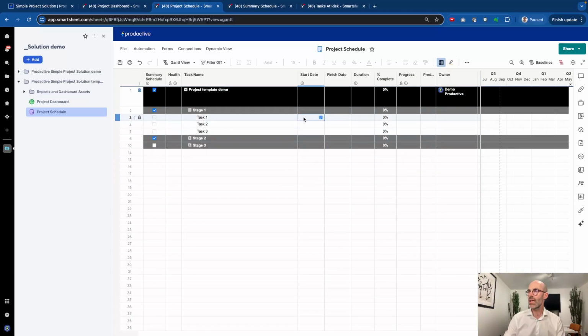But currently there's no dates. So if I put in T for today's date, it's going to come up with the 9th of September, and it's going, well, blimey, this task is looking like it's almost going to be overdue. If I put in yesterday's date, so T-1, you'll see that the task is red, and therefore the overall project is red as well. If I now make this 5 days, you can see it's on track because it's due to be ready. And if I start adding in information in terms of what's the percentage complete, you can see at the moment it says not started. If I now put in 20%, you can see now the project is in progress, it's 20% complete, etc.